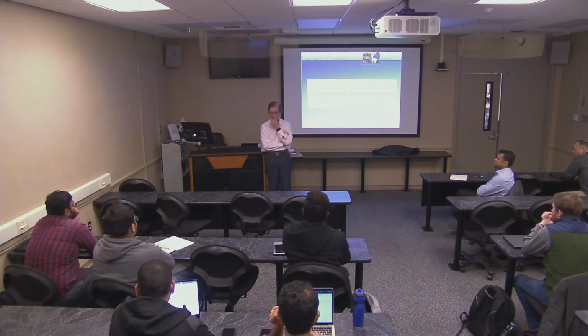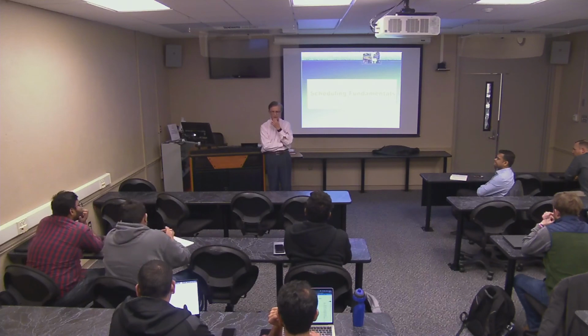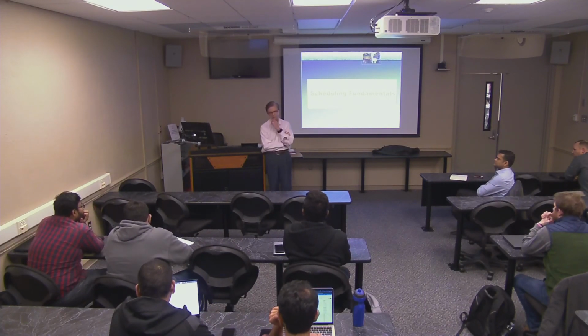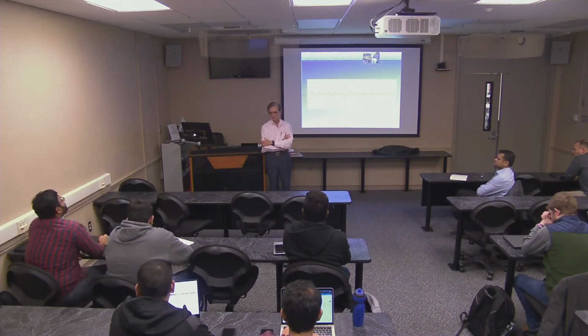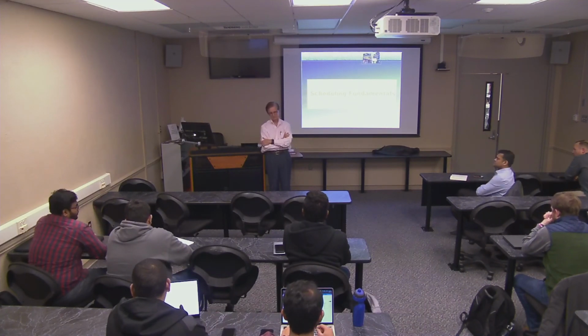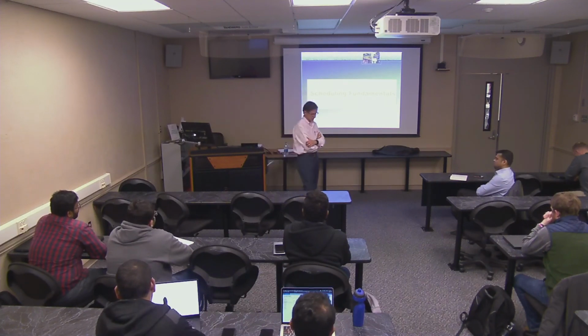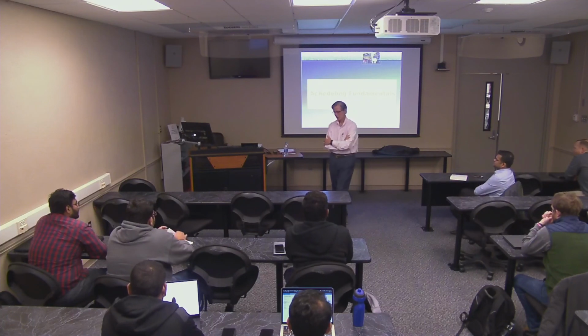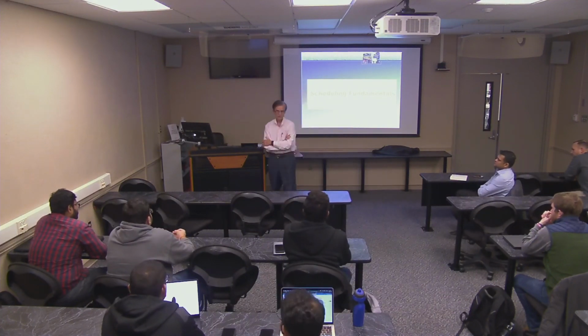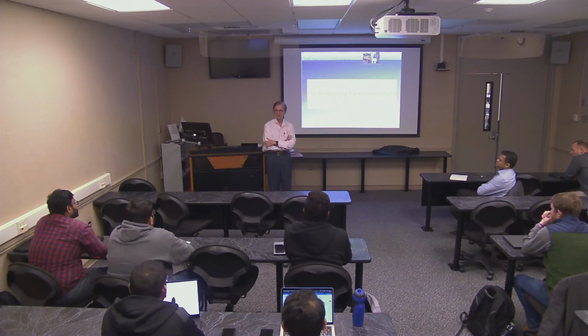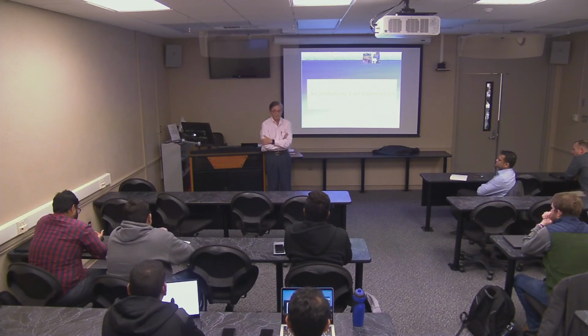Again, I don't see any problem getting through it because I think most of you have some feel for scheduling. If I don't dig deep enough next week on the fundamentals, grab me and I'll try to fill you all in one-on-one. It's pretty basic. From a contractor standpoint, most of the relationships, I don't know what percentage, 70, 80%, maybe 60, are what you call physical relationships. And you can't hang drywall until the studs are up. There's certain things you just can't do. They're physically related. So once you know materials and methods, or have a grasp of that, a lot of that stuff falls into place.